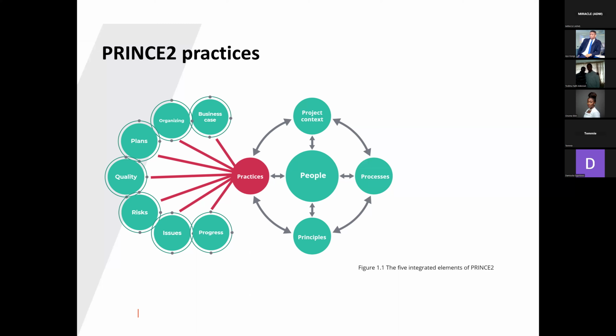What exactly is the probability that it will go wrong? What exactly is the impact if it should go wrong? How do we attack it to make sure that this doesn't go wrong? So these are the questions you are asking the subject matter expert, or the expert on that particular project. As a PM or PMO person, you are expected to ask these questions, document it, and make sure that the log is reviewed on a daily basis.